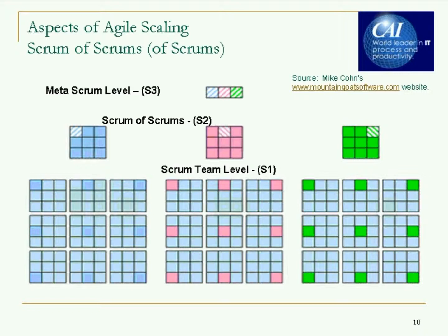How do you share tools? How do you run scripts? How do you get third-party products running? And that's the rub of Scrum of Scrums. Scrum of Scrums is a discussion of how are we doing integration? How are all 9 teams producing deliverables, producing working code and working features, and how are we planning to integrate that to then deploy it to a customer or in an IT environment?